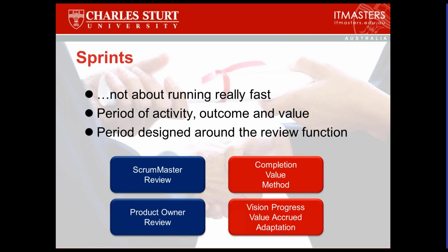Doesn't mean the budget changes. Doesn't mean that the schedule changes. But every piece of work has an opportunity cost. So it might mean they turn around and say, well, we want more of this kind of thing, but we understand that that means you'll have to probably do less of the other thing that we thought we wanted.